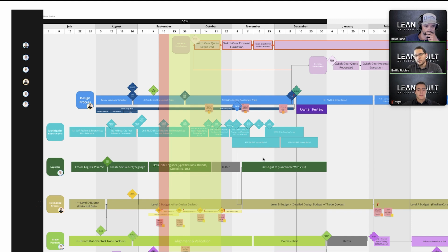Yes, of course. Well, the first thing, as I said, is to involve the right people and the right teams in the conversations. So one thing that we do is to attend all the meetings because we have the different scopes. Like for instance, the design meetings that happen every other week. We attend those meetings and we really pay attention to that, and to some dates that they may say or some durations that they mention, right? And we take notes and we record all this information, and at the end of the meeting we update this timeline, and if we have any questions we follow up with the right person.